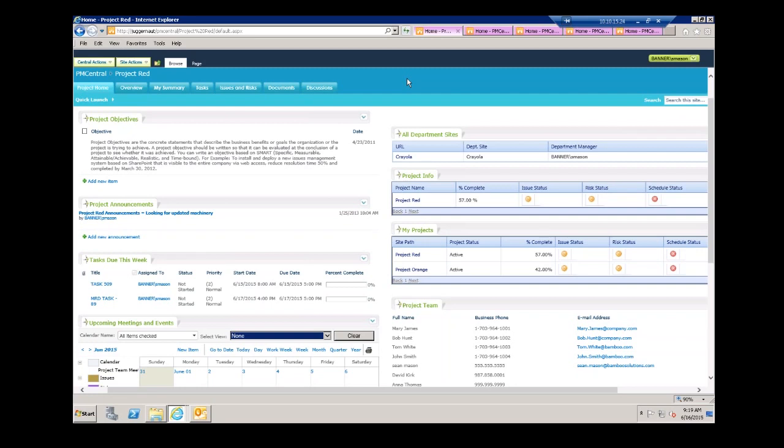And you absolutely can. Here again, after you modified and changed the project, you can save it as a template, put it into the gallery of future project templates, just along with the ones that we have out of the box. And then when you create a new project, you can utilize some of the same existing content that you've created earlier. So documentation, resources, maybe there's certain issues and risks or tasks that are always going to stick with projects when they're created. You can define those at the inception point of the project.